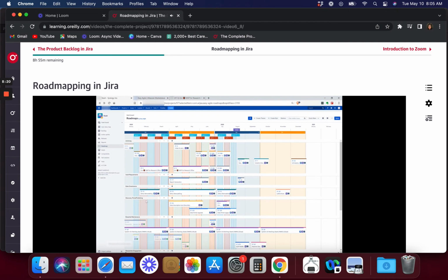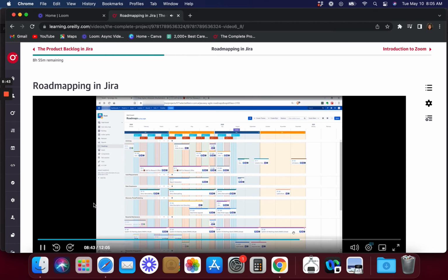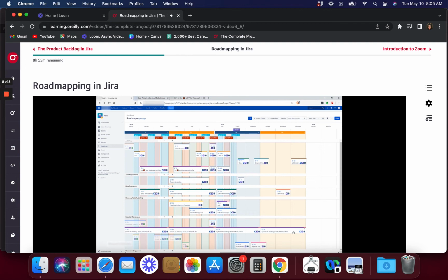So you can see here the first quarter and the work on the second quarter, etc. As a team, when you're looking at how to distribute the work you're going to be doing in your product roadmap, you have to think about your resources, so how many people you have working on this. You have to think about the workload, the complexity of the different things you're doing, and how much you can realistically get done, right? Then you start mapping it out, spreading the different work across the different quarters, across the different months, and across the different streams of work vertically as well, all right?